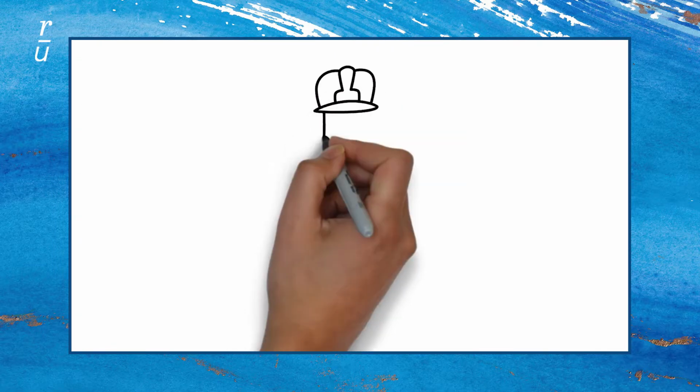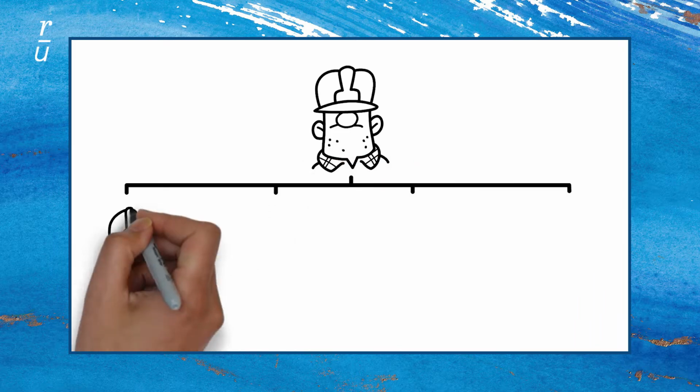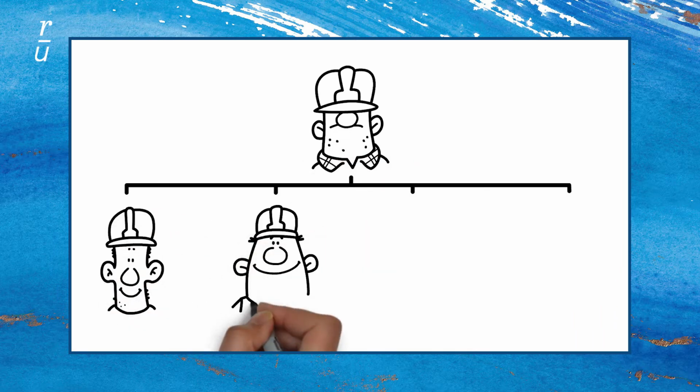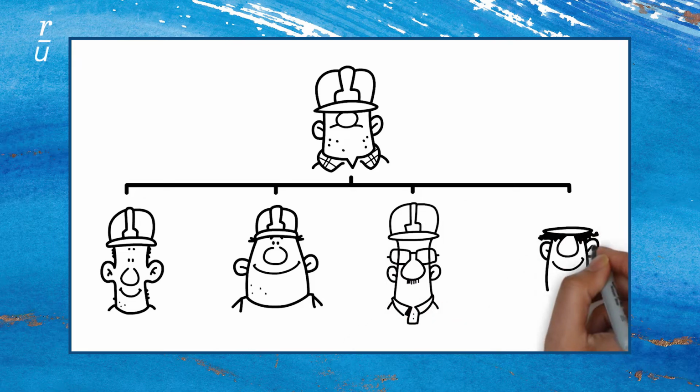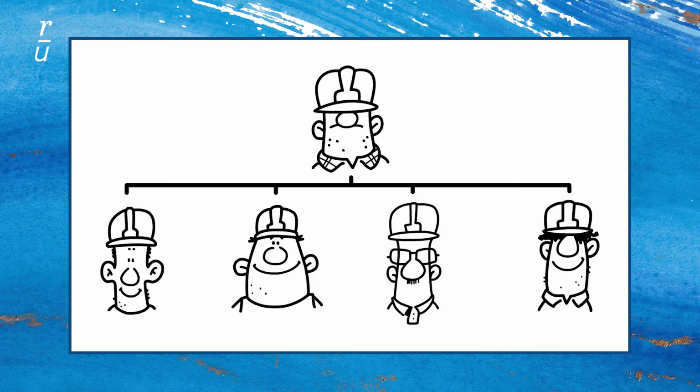If your project is managed by a single contractor who is in full control of the site and who employs the subcontractors used during the contract, property owner's liability should be the only type of liability cover you will need.